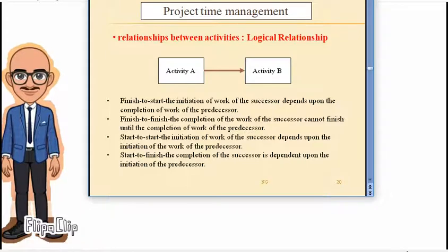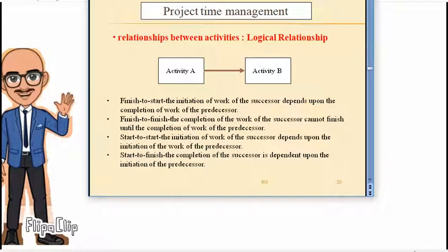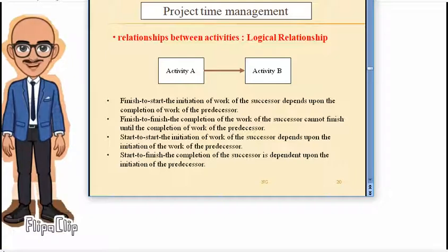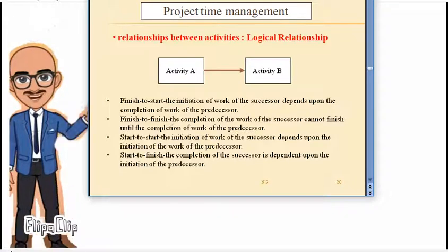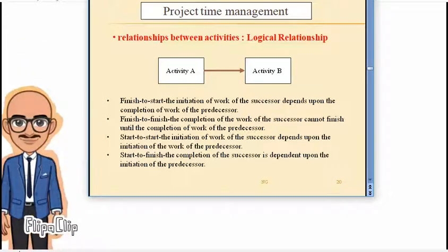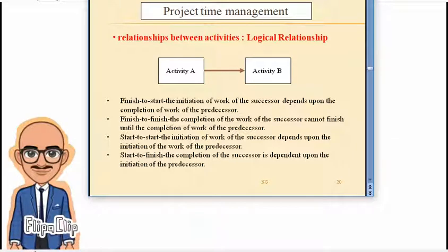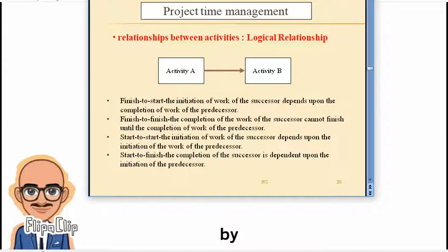Unless the preceding job is completed, the succeeding job cannot be started. Finish to finish: the successor cannot finish until the completion of the work of the predecessor.